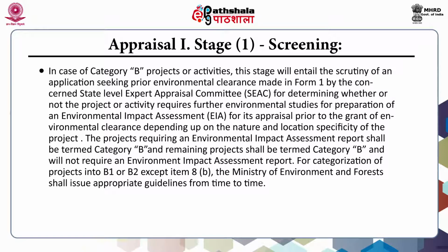This stage will entail the scrutiny of an application seeking prior environmental clearance made in Form 1 by concerned state level expert appraisal committee for determining whether or not the project or activity requires further environmental studies for preparation of an environment impact assessment for its appraisal prior to the grant of environmental clearance, depending on the nature and location specificity of the projects.